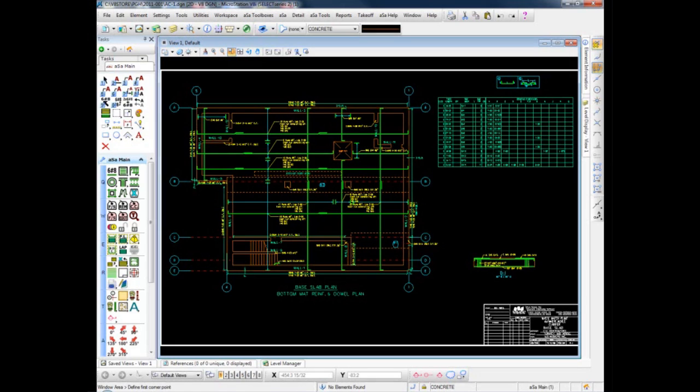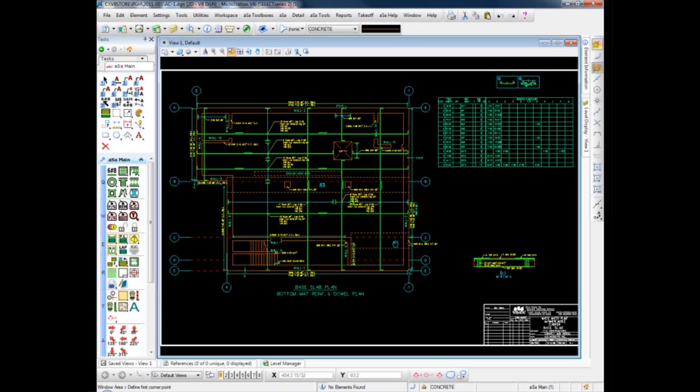When the detailing process is finished and all the drawings have been approved, the last step is to build material takeoffs for fabrication based on field requests. Because all bars were detailed in the ASA system and are present on the drawing, this final step is very fast, automatic, and error free.